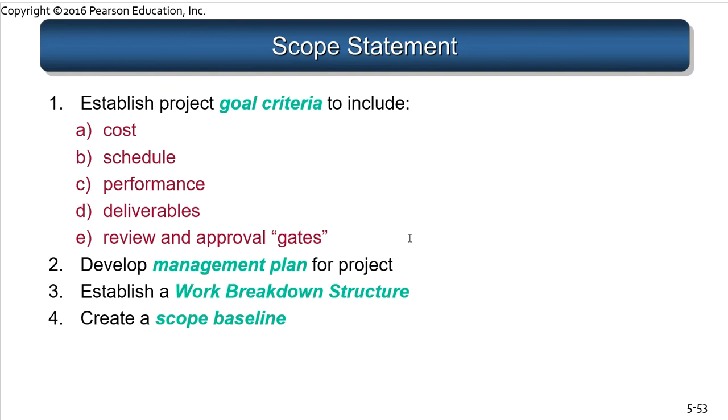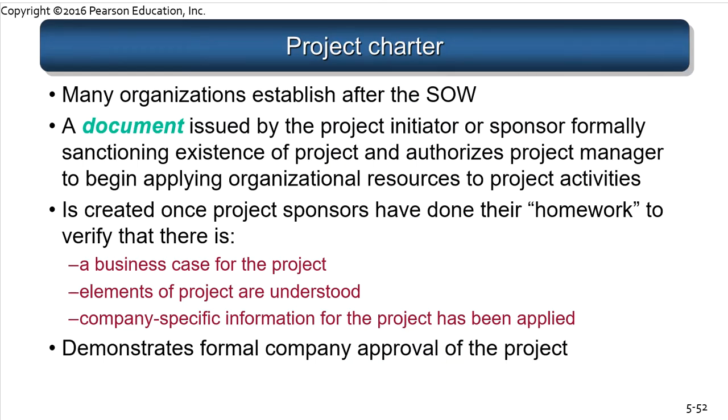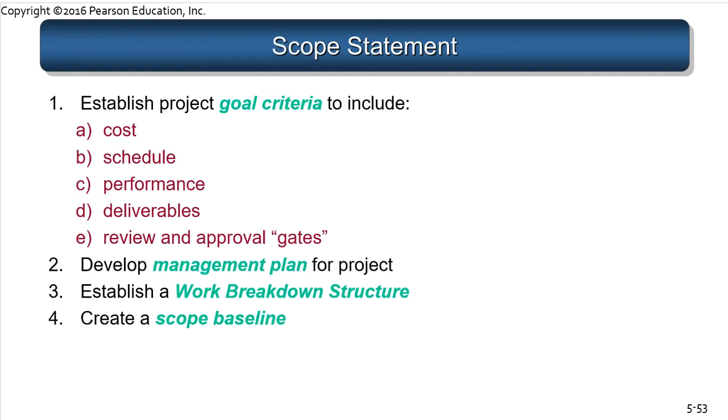It gives a high-level overview of what your project is going to do, but really the charter is not so much about scope. The charter is really about authorization. Why? Because a project operates outside the normal functional organization. So it must have special authorization to acquire resources, to spend money, to do work. It needs that authorization that the normal functional organization wouldn't normally require. Okay? So your project charter is the formal authorization, gives the authority for the project manager and the team to do work. And because it's being given authority, there is going to be some clarity on what the project team is going to do. And that usually starts out simple with the scope statement.